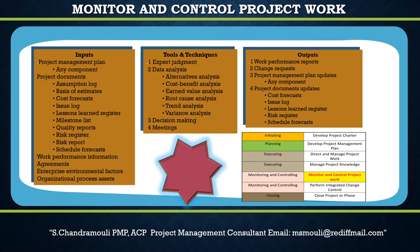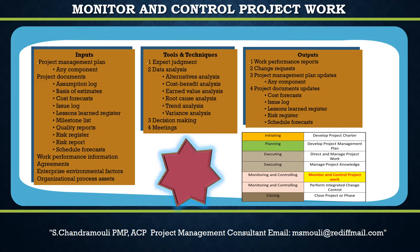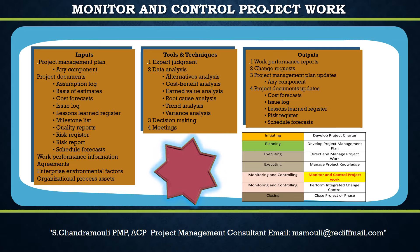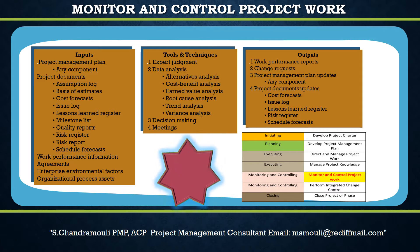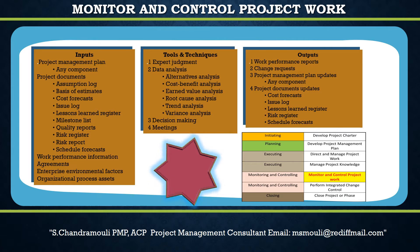Monitor and Control Project Work is concerned with: one, comparing actual project performance against the project management plan; two, assessing performance to determine whether corrective or preventive actions are indicated and recommending those actions as necessary; three, analyzing, tracking, and monitoring project risks to make sure risks are identified, their status is reported, and appropriate risk response plans are being executed.